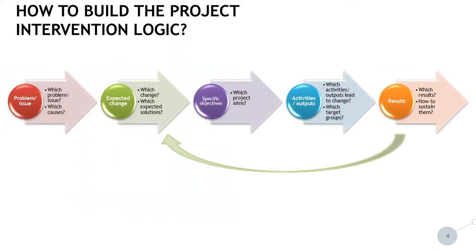Coming now to the question of how to build a project intervention logic. The starting point is the problem or issue to be addressed — which problem exists in a certain region, what causes can be identified, and what is the expected change or solution for addressing this problem. As a next step, one needs to define the specific objectives which the project is aiming for, and the activities and outputs which are leading to these objectives and which consider the target groups to be involved.